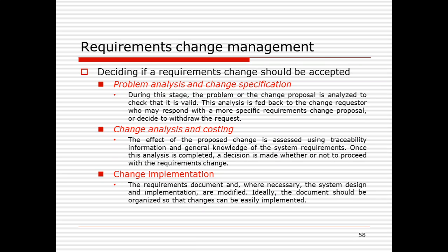The next phase is the cost analysis, that is, change analysis and costing. As we have discussed earlier, a change in the requirement is a costly affair. In the change analysis, the traceability of the changes and the number of changes that will be required to incorporate the change in the requirement are determined, and the cost is calculated: what cost will be involved in the requirement change.